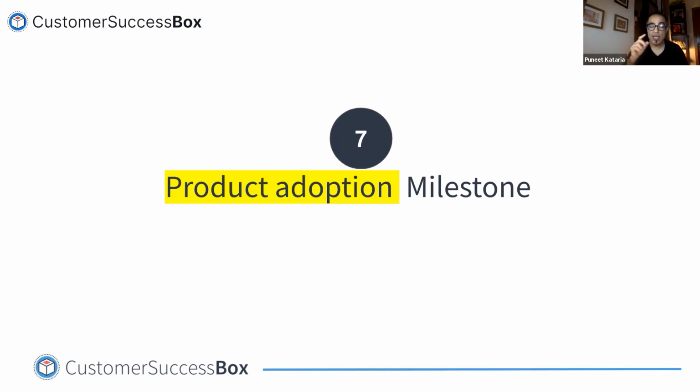And in fact, you should, and we always recommend having a different onboarding journey, different onboarding approach and a plan for all of those use cases, and establishing those use cases in the kickoff call itself. So use case 1 is your number 1 priority, and hence we're going to follow this plan. And once that use case 1 is delivered, for that customer, that's value. And the fastest way to get to that use case should be your focus. So your onboarding plan for customer A, customer B, customer C can be very, very different.